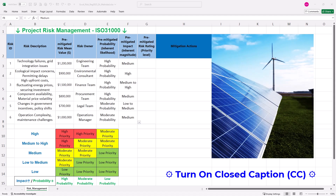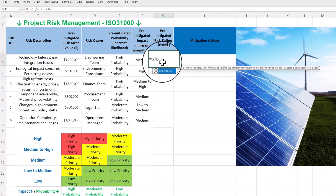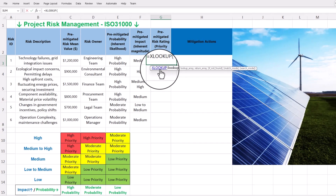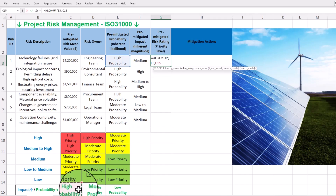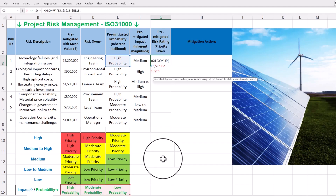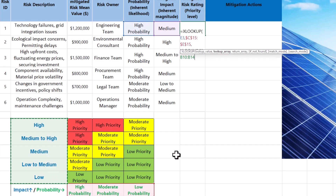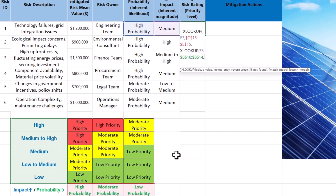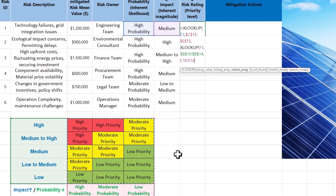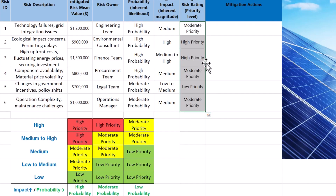Step 2 is prioritizing risks using the XLOOKUP function. We must prioritize risks based on their likelihood and impact using the logic provided in our risk matrix. Click on the relevant cell and call XLOOKUP in the formula bar. The first argument is the lookup value — the likelihood of the first risk in cell E3. The second argument is the lookup array — our range of three possible probabilities in cells C15 to E15, using absolute referencing. We then nest another XLOOKUP to find the impact in cell F3, with the lookup array being cells B10 to B14. The return array is our range of 15 possible priorities in the risk matrix. The formula returns moderate priority for risk 1. We can replicate the formula for all six risks and ratings are calculated 100% automatically.